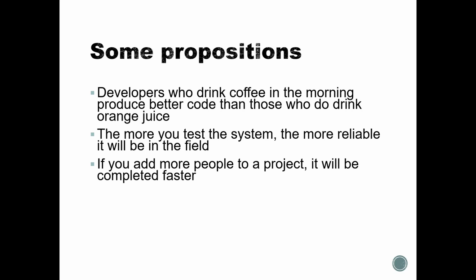But if you throw something like 10 people at that project, you might have something sensible in about a month or 6 weeks. Because you still run into the same problems, you still have to rewrite the source code and so on and so on. So of course you have to measure things. You have to see if everyone has something to do, or if we actually are getting new bugs, or what type of bugs we get, how we get them, when we get them, and why we still keep getting them.